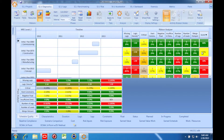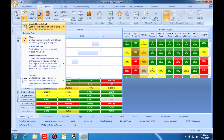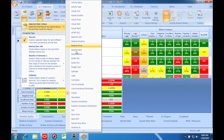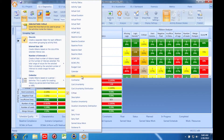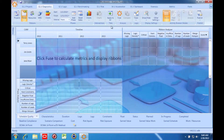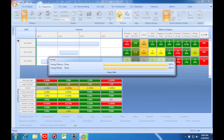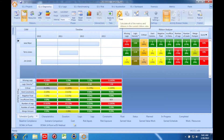Need to group by something other than the WBS coding? No problem. Using the Fields capability, I can group my quality reporting by any field in the schedule, whether it's location, project phase, or any other custom field that you're using. I have a field in my schedule called CAM, which is the control account manager — the individual responsible for the execution of the work. With just a couple of clicks, I can group my output by CAM and see the metric results and overall score for each by name.